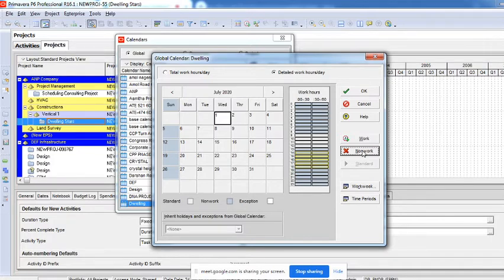An employee comes to an office, there's a biometric in his office probably, and he'll sign in at that particular time, and he'll sign off after 10 hours. But in project management, it probably shows only 4 hours, because the amount of work he has done on that particular project is only 4 hours on that day, and the rest could be a client audit or something else. He's busy with something else, so we are not considering those working hours.